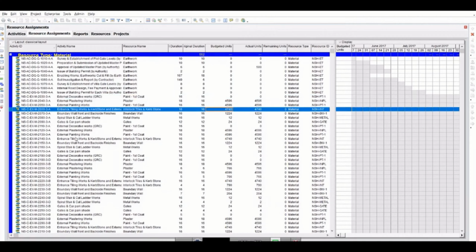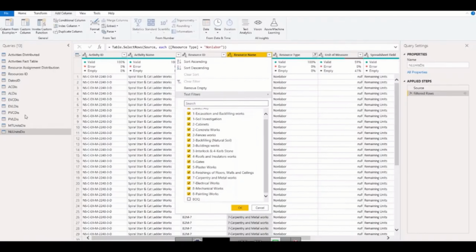So that's why we brought resource assignment field, and this resource assignment field is reflecting in Power Query from this resource assignment distribution. So in this we can have material unit, but what type of material unit? Budgeted unit and actual unit, at completion and remaining unit, and non-labor also. So non-labor distributed unit we also have here. If you want to check how many bobcat, excavator, shovels are there, we can check from here as well. So make sure, because either material or non-labor, you will assign a total cost, you need to remove that resource. So in my case it is the one.